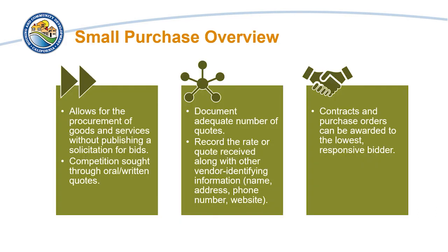Small purchases allow for the procurement of goods and services that does not require publishing a solicitation for bids. Rather, competition is sought through oral or written quotes. Grantees must document that an adequate number of quotes — typically three or more — were received, and record the rate or quote received along with other vendor identifying information such as name, address, phone number, and website. Contracts and purchase orders can be awarded to the lowest responsive bidder.